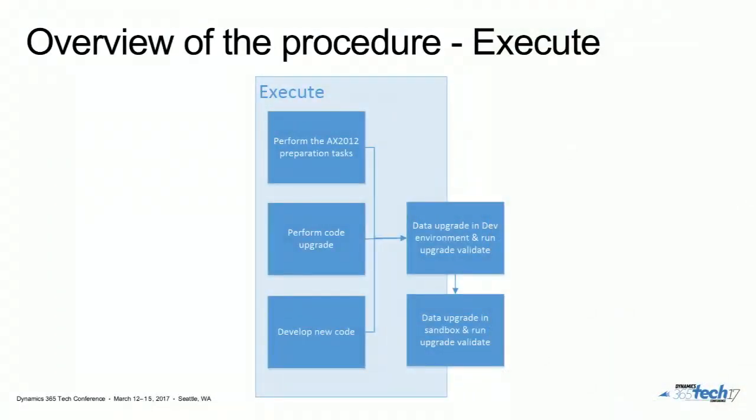So, there's a lot about analyze. Execute, you'll be pleased to know, isn't that complicated. You're basically just doing all the things you talked about analyzing in the first place. So the diagram is, okay, perform the preparation tasks. Yeah, you run the analyzer against 2012. Now you need to do the things that it told you. It's nothing really different now. Perform the code upgrade. Someone actually goes and does the code upgrade tasks. Develop new code is meant to be the relation between having done that basic fit gap with your sandbox environment that you deployed, where you may have discovered new features you wanted, etc. There's another work stream coming from that.